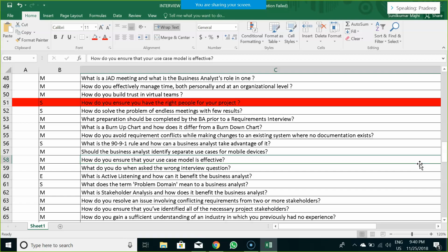So what's the competency approach? First thing we have to do is identify the key list of all the soft skills and hard skills needed for the project. And one more technique I'm going to use is a numeric range from 1 to 10 for the minimum level of competency needed for each skill. Sometimes it may be 5 for one skill in some context. So we are going to rate each team member on each skill. Then we find out if most of the team is not meeting the required threshold for a particular skill. This is a problem area that requires attention, so we are going to find resources for them to improve.